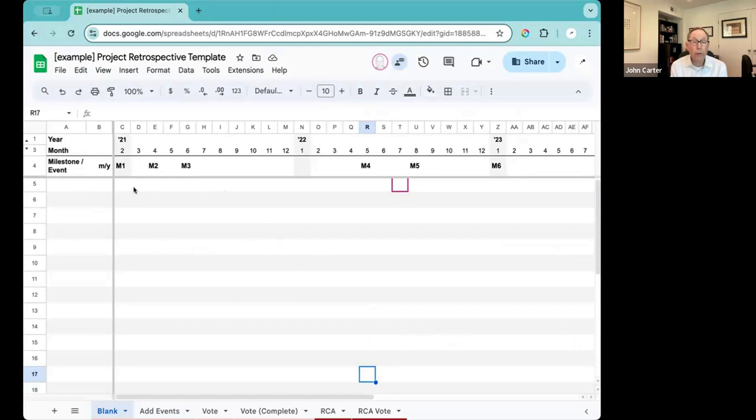Yeah, good question. So I think one of the things, and we'll just take it back a little bit to selecting the projects to analyze. You want to analyze projects that have been recently completed or nearly completed. It is a retrospective. And also you want to analyze projects that are material and representative of those you imagine in the future.